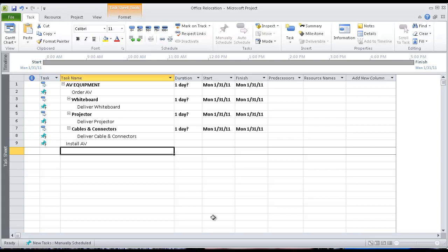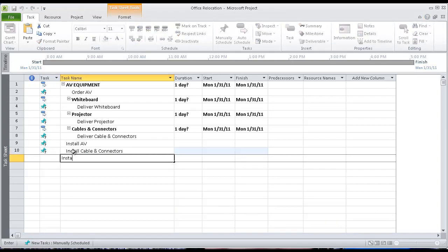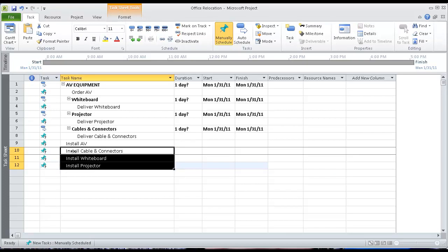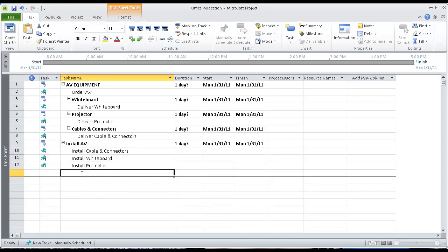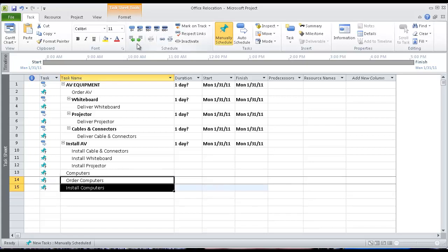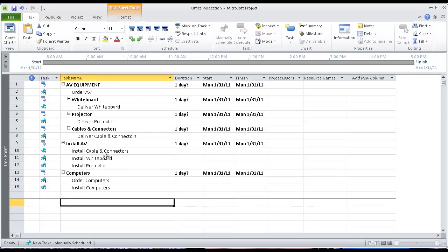Once all my tasks are entered for my WBS, I will begin to define my activities. Defining activities are the steps required to complete your WBS. In MS Project terms, they are simply more tasks. The PMBOK calls them activities. Project calls them tasks. If I right-click a task, the result is a pop-up list.